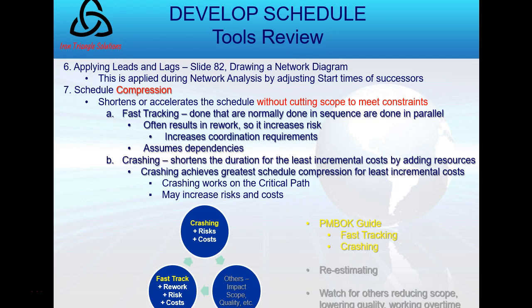Crashing is different. Crashing is where, in a layman's way of saying it, I'm going to add money to make the project go faster. But the formal definition is, I'm going to shorten the duration, which is making the project go faster, for the least amount of cost by adding resources. And that's what crashing is about.